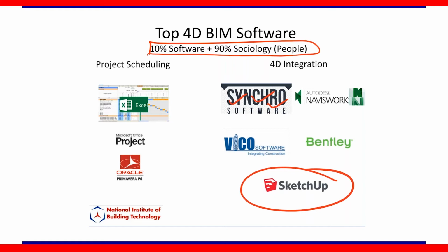Now, with the visualization, SketchUp is becoming very common these days, right? What people do is they're not necessarily getting a detailed schedule, but let's say they're trying to bid on a project, they'll get into SketchUp, they'll build a quick block model, don't get into details, a quick schedule, and they'll connect it with the SketchUp model. In a matter of a few days, you have a fantastic model of how you want to build a building. It's very big picture, it's not detailed, it's not supposed to get into the manufacture level or the detail level that 4D is really intended to do. But this is very high level pre-construction analysis that you could do using SketchUp. So that's why I kept it very down.